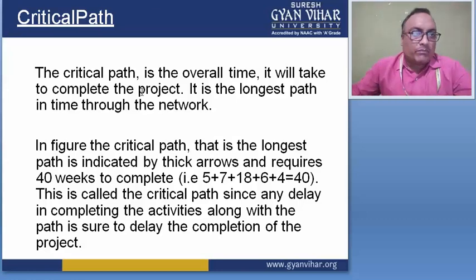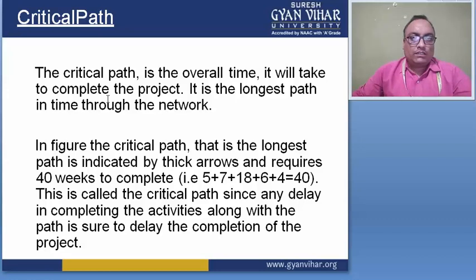For the critical path method, this is one of the best examples to understand how to give the different types of activities and how to complete the task in the critical path method. This example shows that the critical path is the overall time it will take to complete the project. It is the longest path in time through the network.